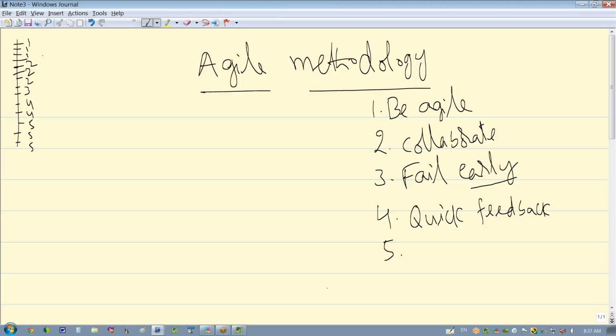So I'll take these top priority items, the 1, 1, 1, and say I will deliver them. I'm getting into too much jargon. The business user says, my project can't be delivered without these 3 top priority items. After that, we can add one change at a time as we move forward. Absolutely. Okay, I'll take those 3 items. So this is how I work. Rather than working in silos over months, I will deliver the software in quick, short intervals. Those intervals can be as short as 1 week, but generally they last 2 weeks.